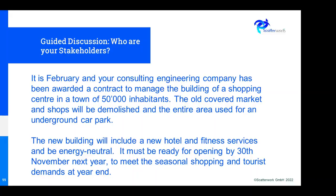It's February and your consulting engineering company has a contract to manage the building of a shopping center in a town of 50,000 inhabitants. They're going to demolish an old covered market and shops, and the entire area will be used for an underground car park. The new building will include a new hotel, fitness services, and it will be energy neutral. It must be open by 30th November next year, because that's coming up to the Christmas period and early January — the time of seasonal shopping and tourist demand.